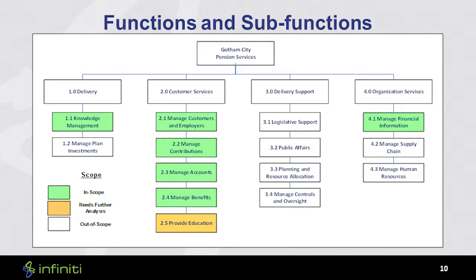Another practical situation that happened is while we were talking to stakeholders, the individuals with the expertise who were doing the work every day would come in and we would start talking to them about their requirements, and they made assumptions about the scope of this effort, what was in and out of the system. And they also made assumptions about what old legacy systems were going to be replaced by the new system. As we started discussing requirements, they would say, well, I know that the new system is going to replace ABC system. And we'd look at each other and go, no, it's not. And they'd say, oh, yes, it is.